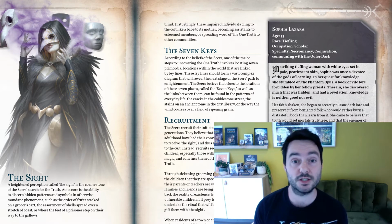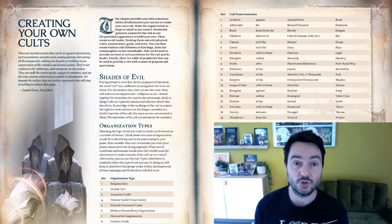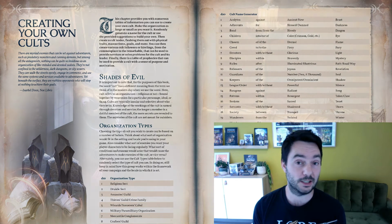When the digital files are done and nothing changes anymore, they're going to be prepped for manufacturing, which is called a pre-press phase, which is technically getting the book ready for manufacturing in a print format. Due to COVID, manufacturing times have increased a lot, and also transportation logistics times really are much longer these days. So that's why we are planning quite defensively, and we expect that in the first quarter of next year, the goods may arrive in America in our various warehouses.